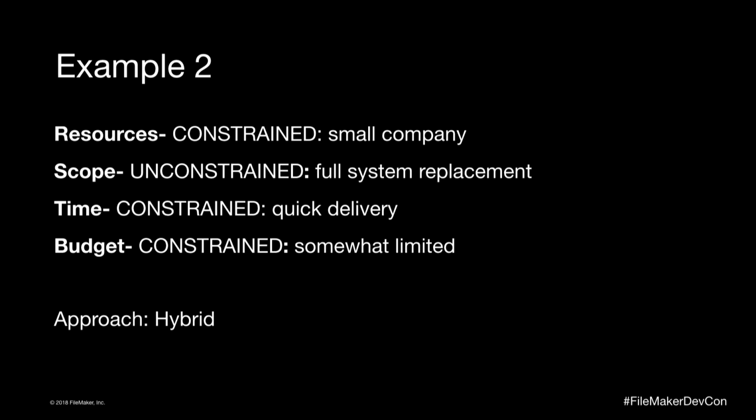But then what I would do is in my building process, I would take advantage of all of the Agile techniques and run Agile. And I would break up the bigger project into modules. I would deliver the first minimum viable product, and then I would add on to it and add the next iteration and the next iteration and add on until we've delivered the full system. And hopefully we'll be able to deliver the bulk of what we need in those 6 months and then add on. And it also helps guide the budget as we go with this client.